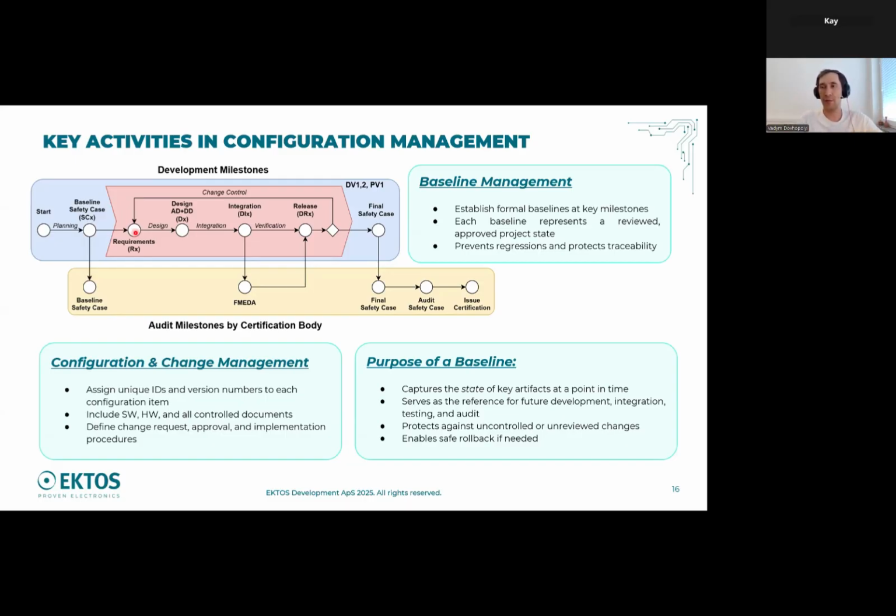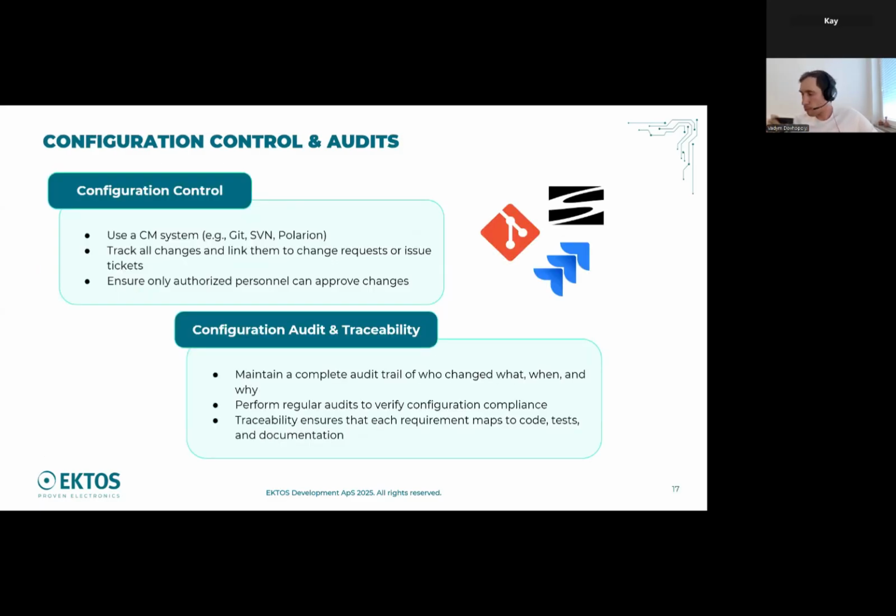We have to store them and formally create a checklist or whatever, just peg that, okay, this version in this milestone is part of this audit, and in place, everything is reviewed, finalized, so there are no comments and everything is okay, and move forward. Also, it is sometimes in companies called gate models, like a gate. You have to prepare everything to pass the gate to go to the next stage. So it serves for this purpose.